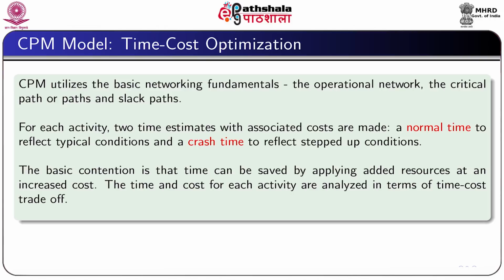A normal time reflects typical or normal condition, whereas a crash time reflects stepped up condition. The prime objective is that the time can be saved by applying added resources at an increased cost. The time and cost for each activity therefore need to be analyzed in terms of time cost trade off.